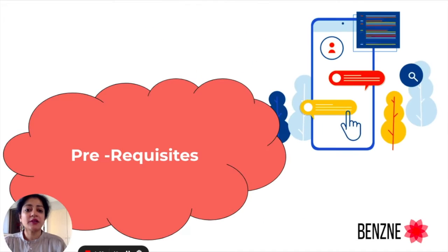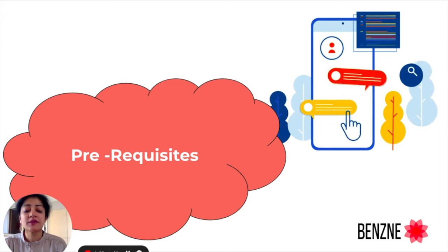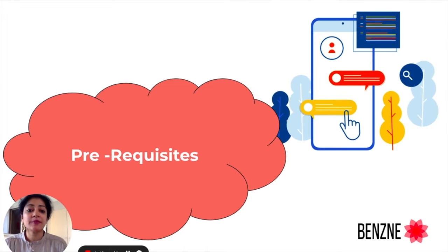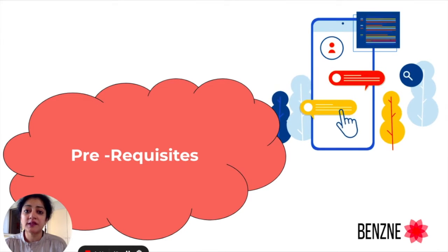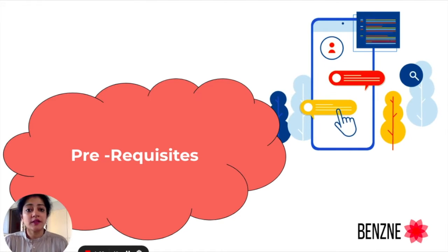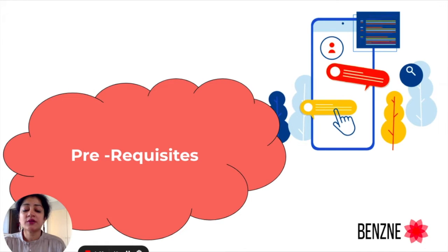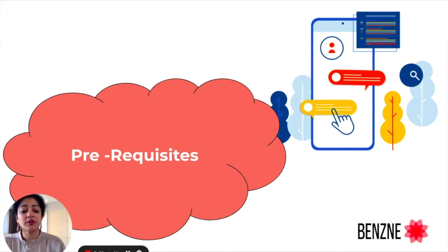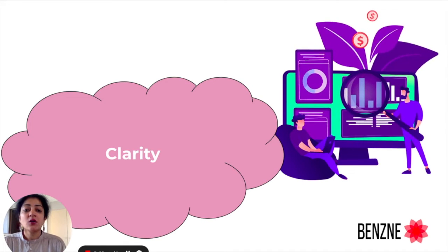So let's begin with the prerequisites. As part of the refinement meeting or event, the product owner must load the sprint backlog with the work items or user stories that are planned for the upcoming sprint. The development team, in turn, must seek all clarity on the user stories and figure out the size of the stories for the upcoming sprint. So, as part of prerequisite, the sprint backlog is organized with user stories and prioritized and estimated by the product owner. Now, once this is in place, we're all set to start sprint planning on day one.